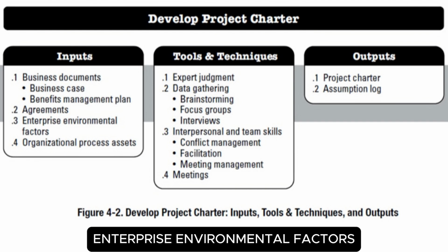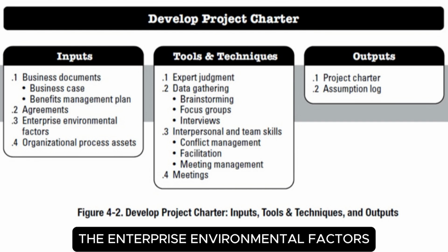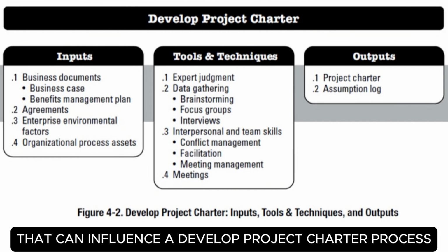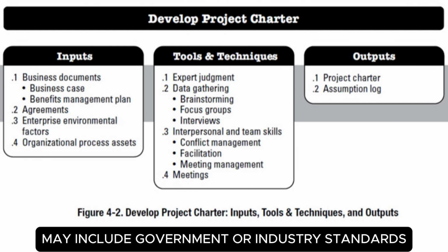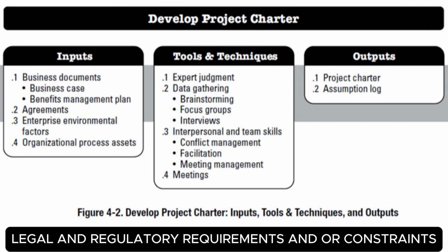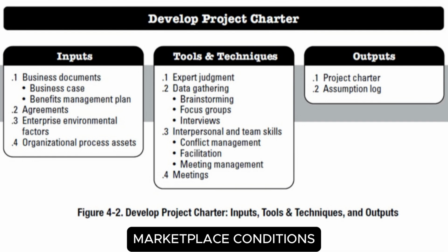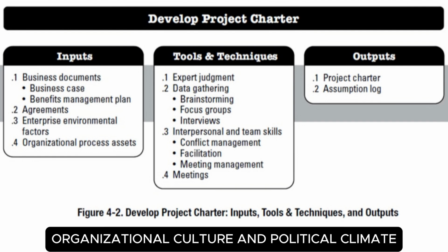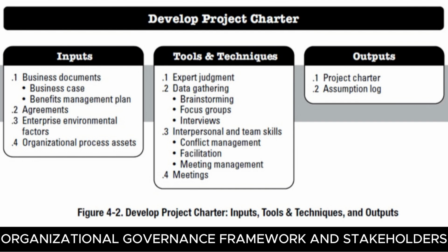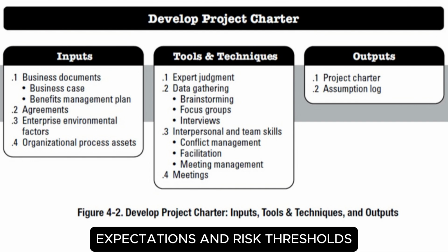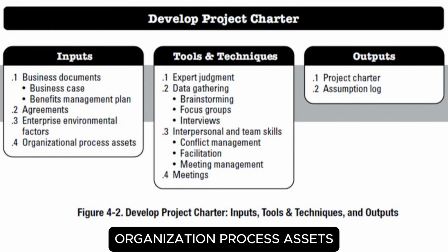Enterprise environmental factors. The enterprise environmental factors that can influence the develop project charter process may include government or industry standards, legal and regulatory requirements and or constraints, marketplace conditions, organizational culture and political climate, organizational governance framework, and stakeholders' expectations and risk thresholds.